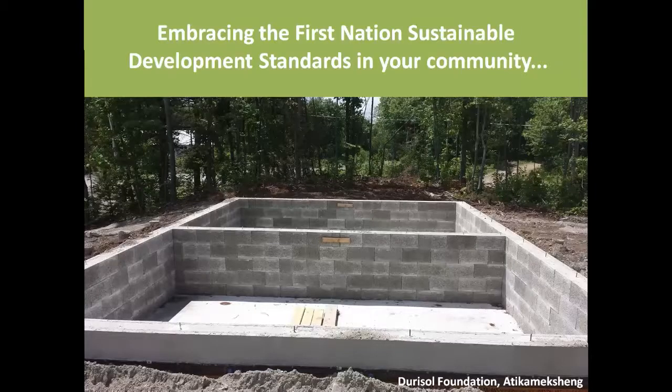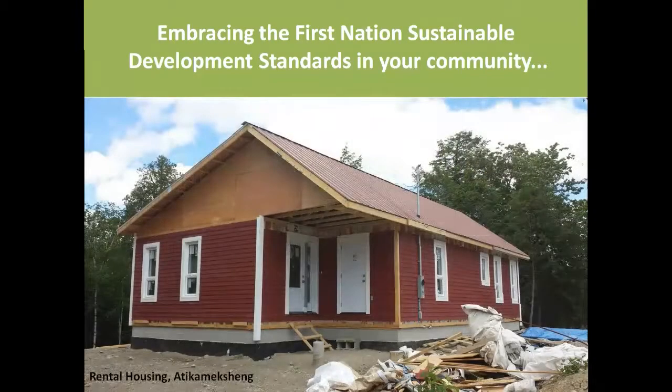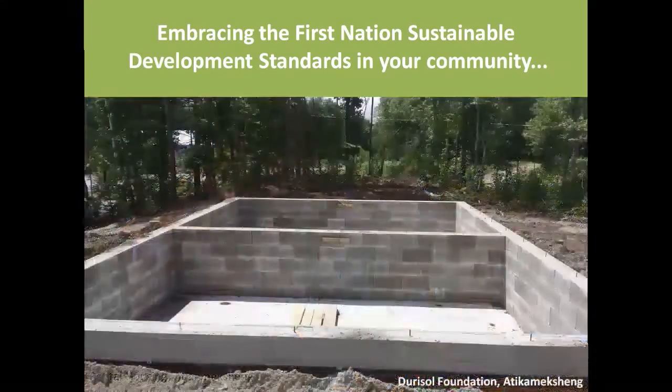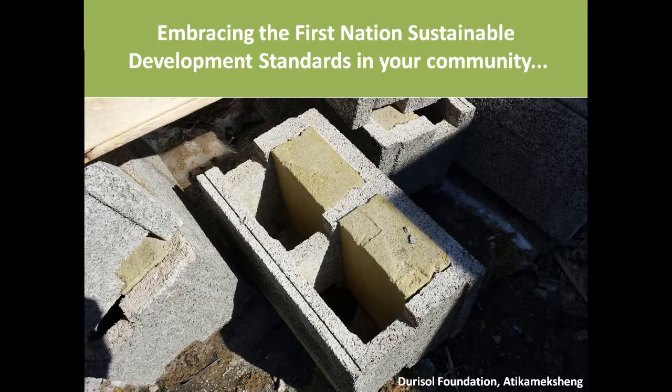Yeah, little things. This is the foundations for the 2-story, the illustration I showed originally. And what happened here was the houses were delivered. They were too large to be delivered with a roof on it. So they had a sheathing on it and some plastic basically. And there was a large storm, and unfortunately that didn't hold up, and water got in. So there was this brand new 2-story duplex, two semi-detached dwellings, and it was wet. I walked in there and told the guys they had to rip it right down to the bones essentially to start over because there would be mold everywhere.